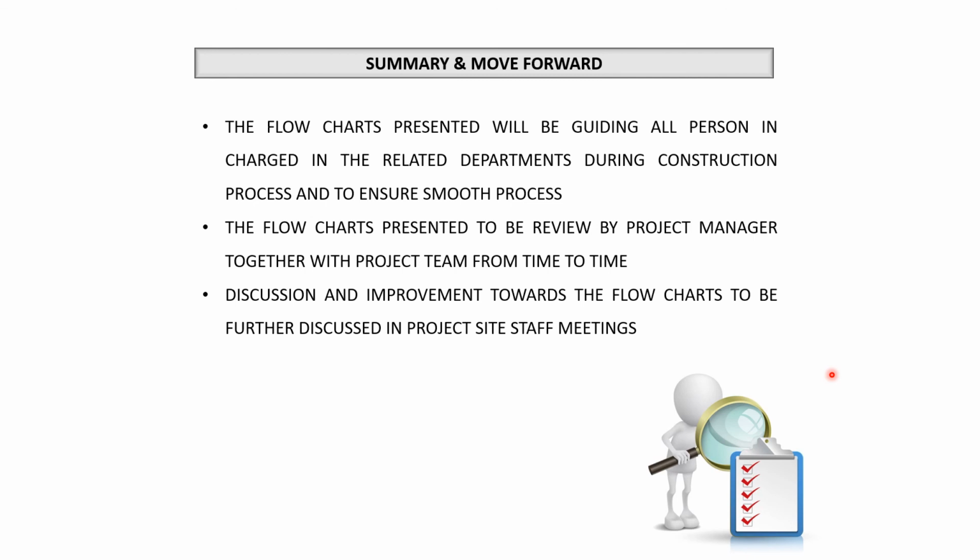Okay, you can have a daily meeting to follow up on the progress of work, and you will need to have a weekly staff meeting to discuss overall what are the things that can be improved. So I would suggest daily to have a very short, brief and dense staff meeting. Don't go too long on the daily meeting. Daily meeting is just to discuss what is the target.